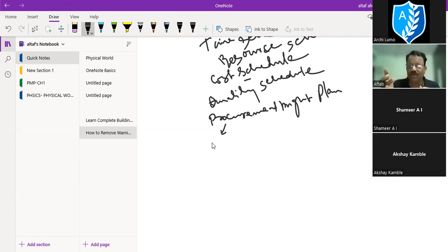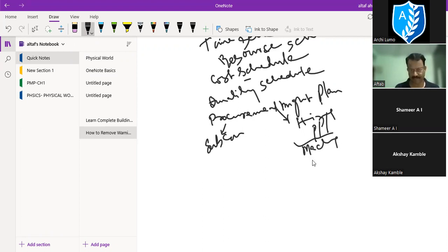Then you have to subcontract some parts, maybe the skeleton part to someone, maybe the finishing part, definitely the MEP part, or the waterproofing part to a specialized contractor. So you will be using subcontractors, and you will also be hiring people, machinery, whatever it may be, and material to do the project in-house. So this total procurement part you will be doing.